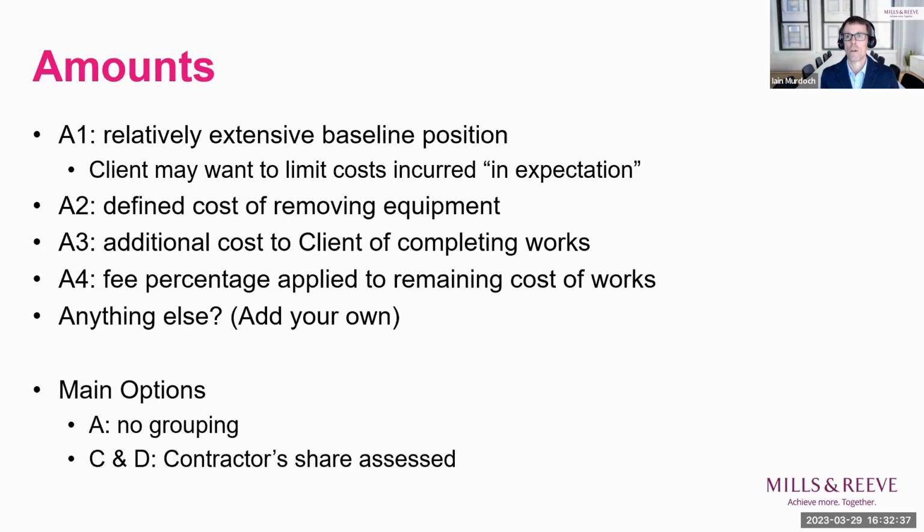If you're working on a very long project, it may be inappropriate to pick the bill up for things over the whole of the life of the works. But then from the contractor's point of view, it may also be important to highlight that certain fixed costs are being incurred almost from day one or early on in the project, and be sure that you can pick up those costs entirely appropriately if everyone knows what's going on, if the worst was to come to the worst and the project wasn't going to proceed.